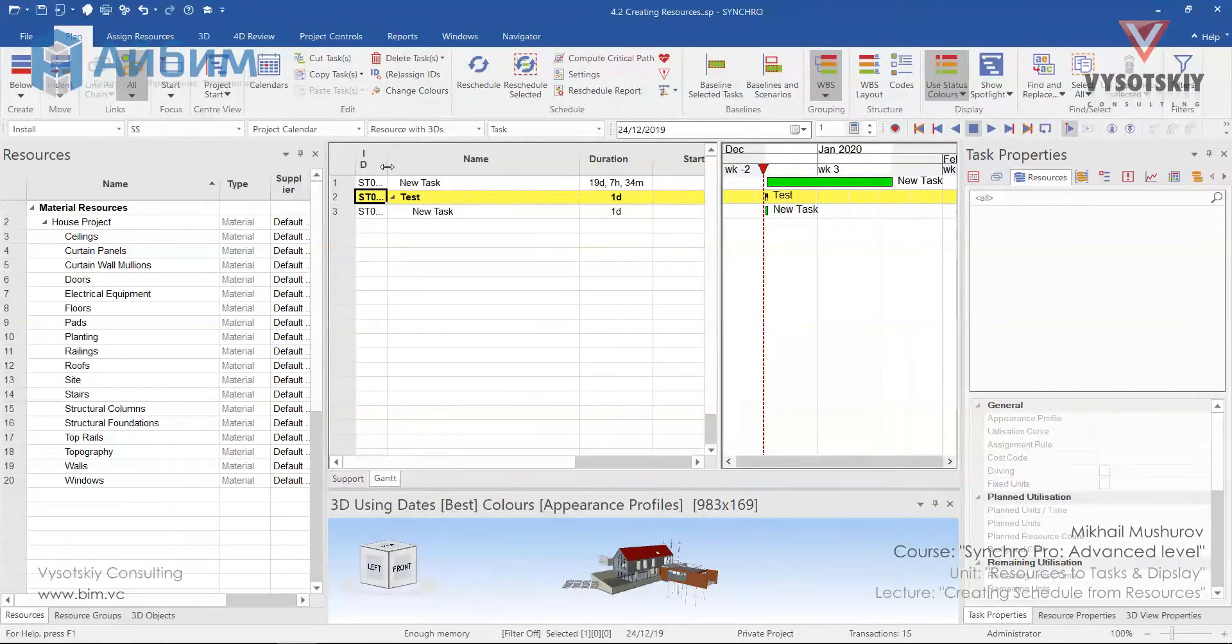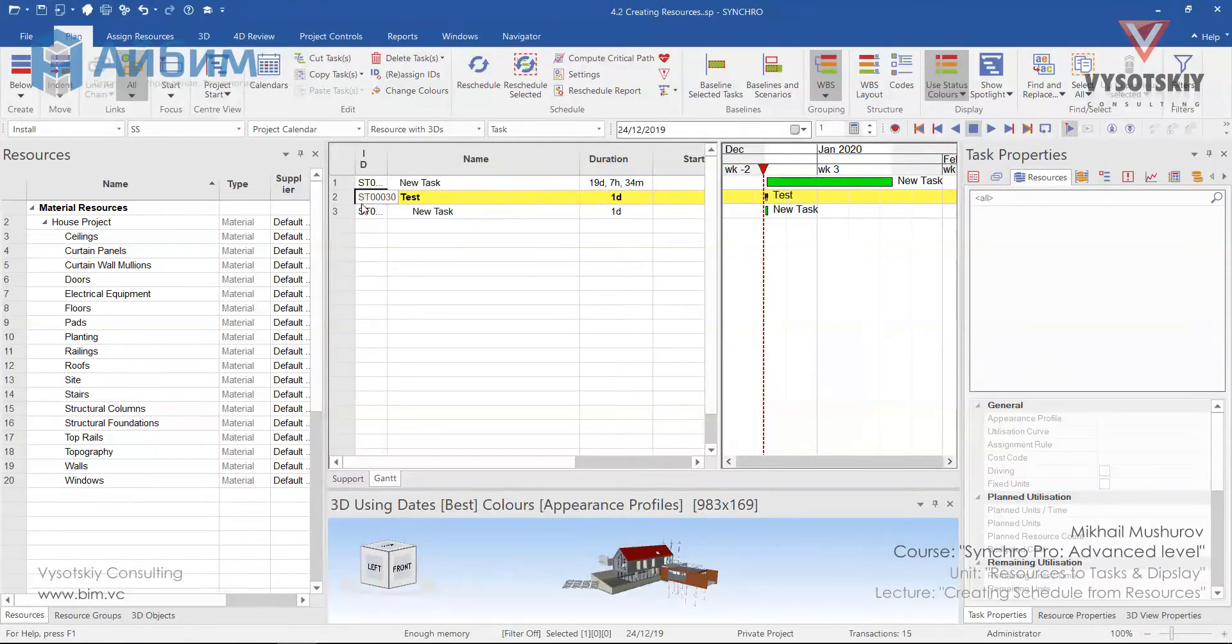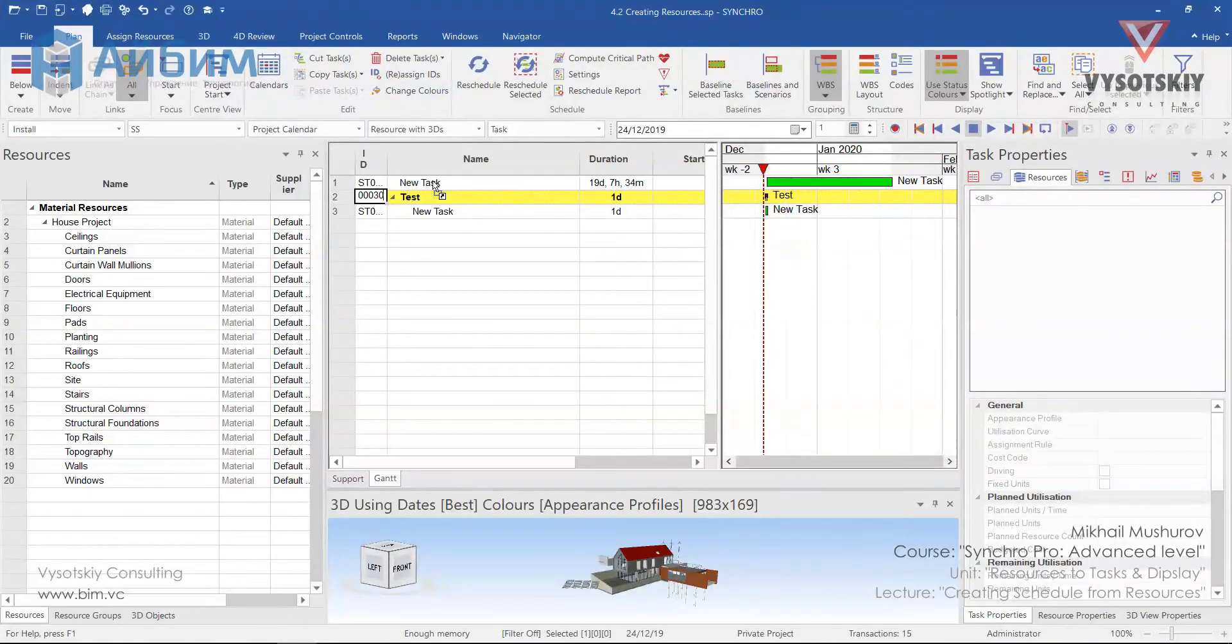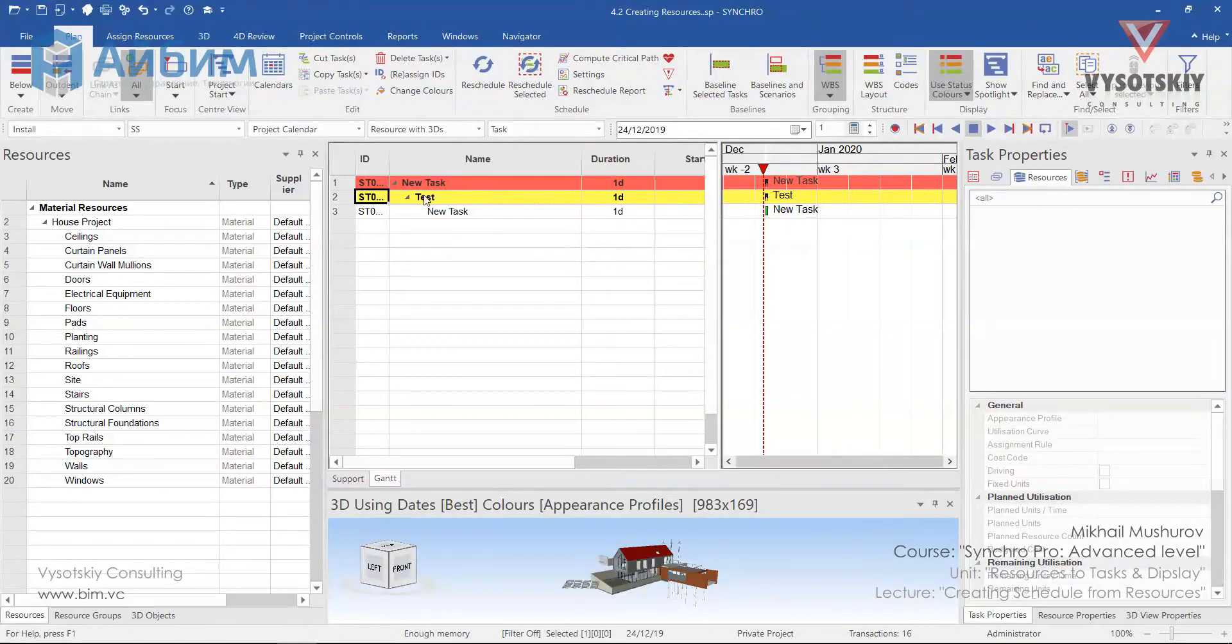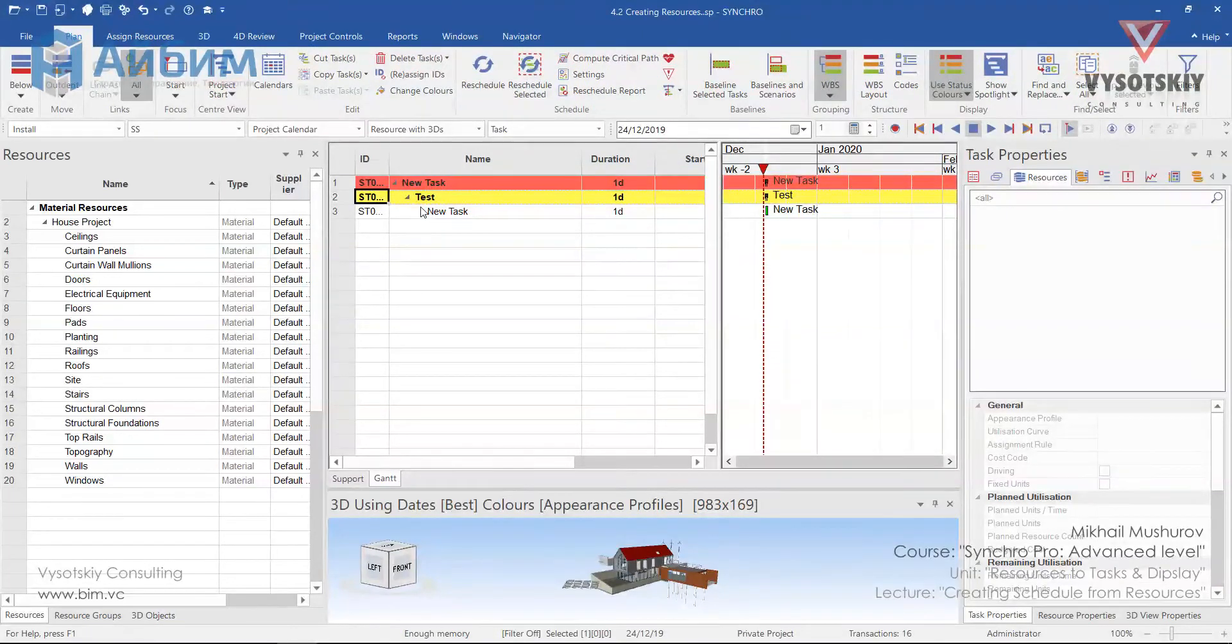Another way of indenting tasks below one another is we can click over the task and drag it over another task. The new task has become a summary activity for task and new task.